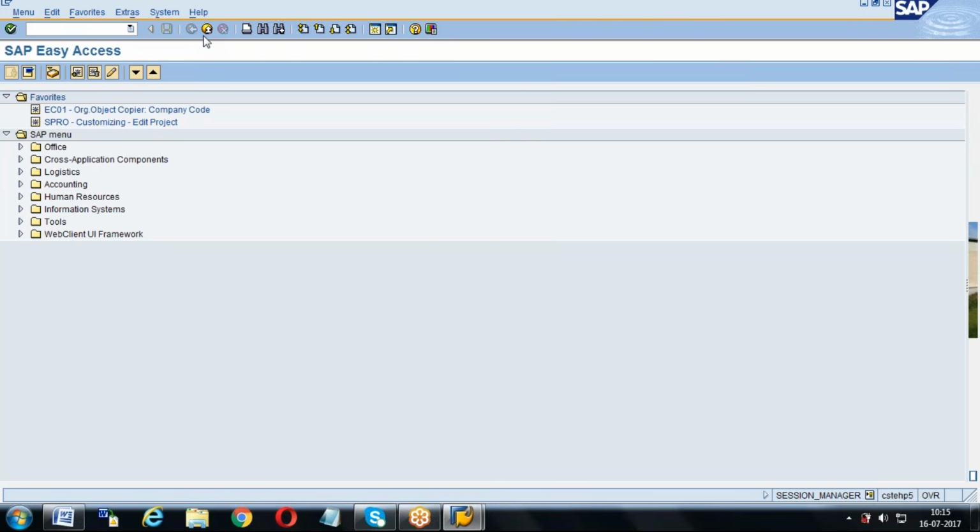Then they will derive: for MM we will keep 3 consultants, and for FI some 3 consultants, 1 senior and 2 junior. They will calculate the budget and the work. Then they design how many developments we are expecting. They say they already need some 60 forms: PO, label forms, sales forms, billing forms, whatever it is. They are also expecting some automation or customization, and connections with their own non-ERP systems.